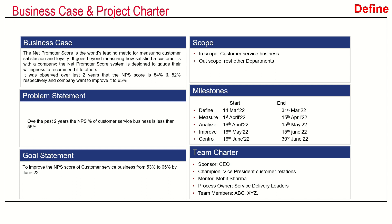The project charter has six elements: business case, problem statement, goal statement, scope of the project, milestones, and team charter. The goal is to improve the NPS score of the customer service business from 53% to 65% by June 2022. The scope of the project: in-scope is the customer service business, and out of scope is the rest of the other departments. The project started on 14th March 2022 and was targeted for completion by 30th June 2022.